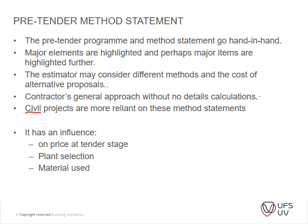Civil projects are more reliant on method statements than building projects. In standard building measurement, there's a lot of detail in the drawings and the QS effectively does the method statement for the contractor. In civil works, a contractor may receive a drawing of a pump house measured as one item and must write a full method statement to price it. There is a key difference between buildings and civil work.